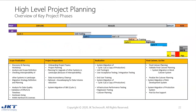Here is an overview of key project phases. We start with scope finalization, where discovery and planning workshops are done, along with analysis and scope definition, data quality analysis, validation of efforts, timelines, hardware sizing, and HANA hardware and licenses. In project preparation, we onboard the project teams, do project planning, data inconsistency cleanup, housekeeping, or data volume reduction if required, and start system migration for cycle one — the sandbox system. In realization, we migrate subsequent systems in the landscape, do user acceptance testing and integration testing, and prepare for cut-over planning. In go-live, we do the final cut-over and provide post-go-live support.